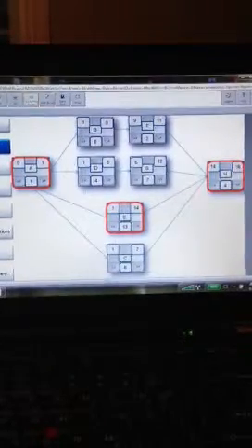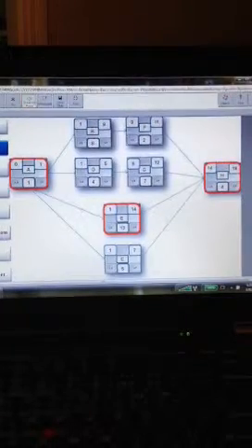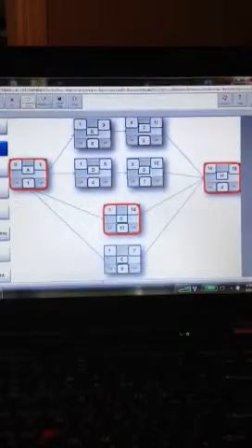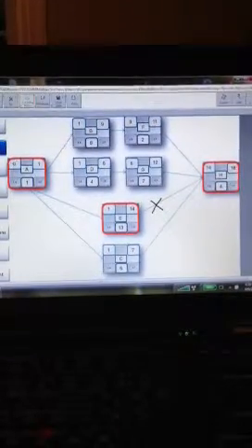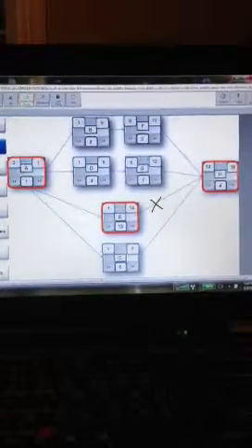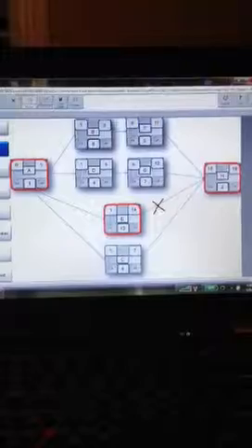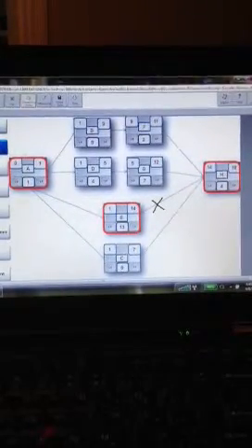And then we look at the resources that we currently have available for activities A, E, and H and realize that somewhere in here, Jim's on vacation. Because we look at the resource calendar and Jim is not there, and there is no float time on the critical path. There's no time for slacking off. He needs to start activity E on day 14, or we're going to create problems with our schedule.